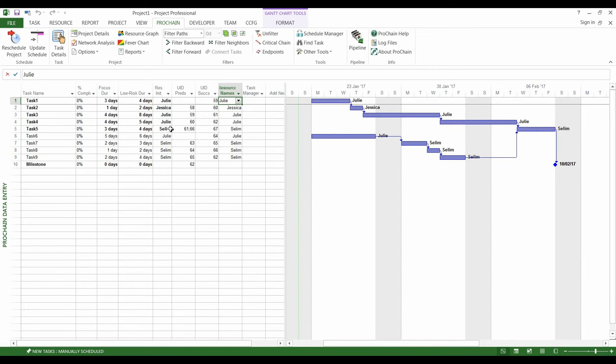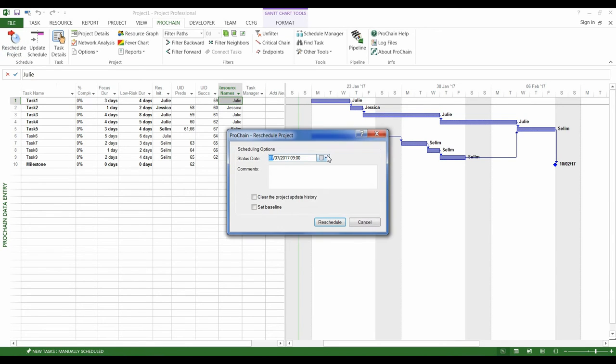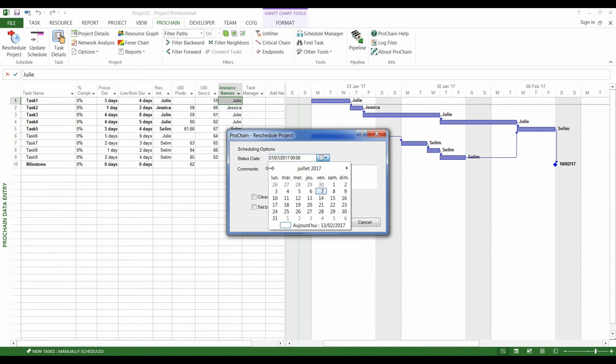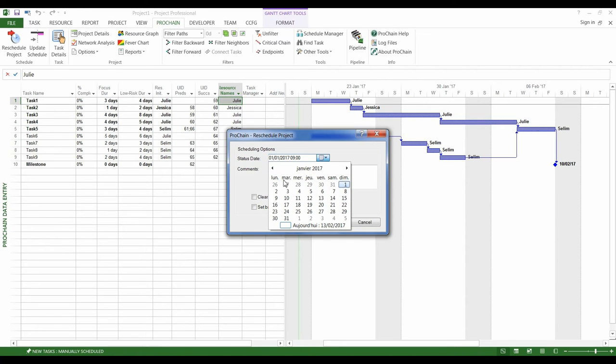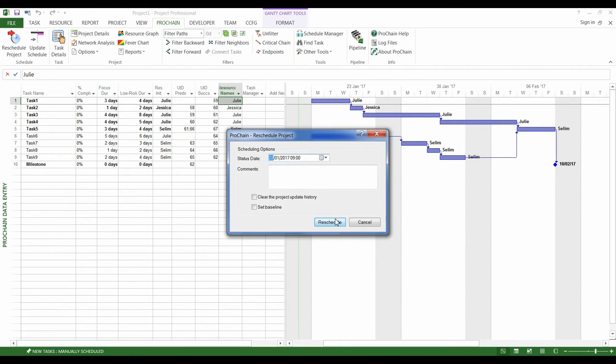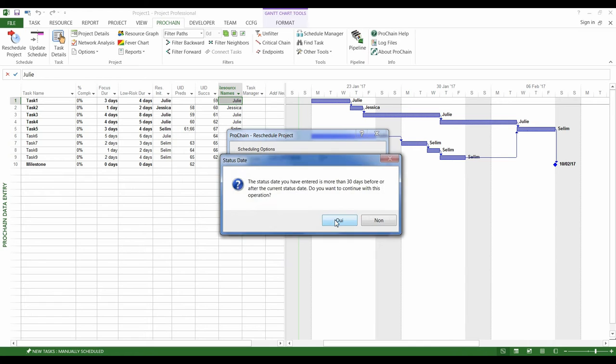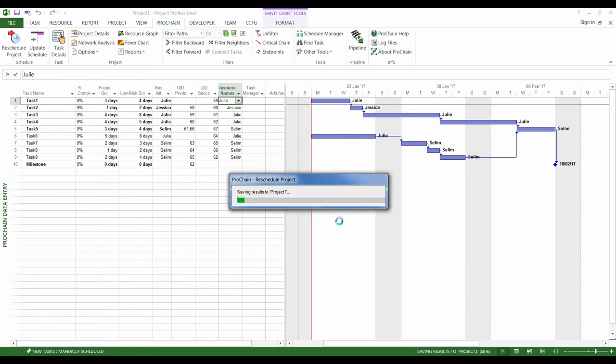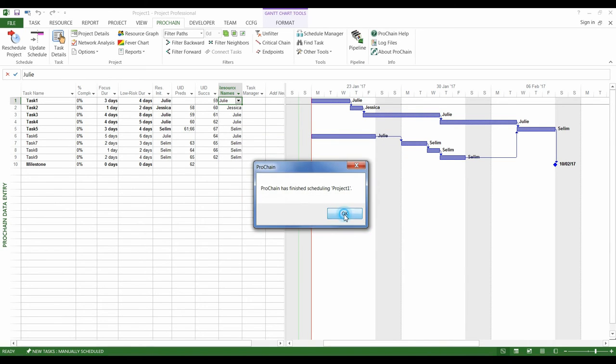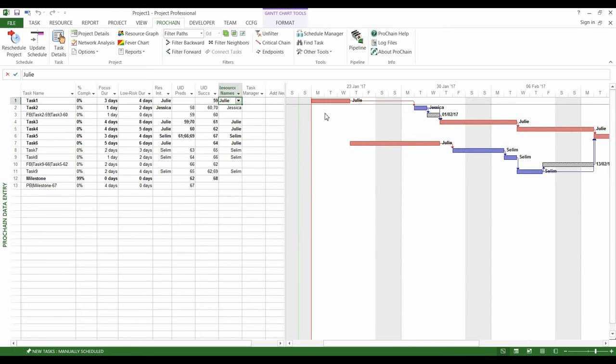Once this work is done, we can turn our schedule into a Critical Chain schedule. The ProChain add-on does it on request. It puts forward the Critical Chain, which is the longest sequence of tasks in the project, and then it sizes and positions the feeding and project buffers.